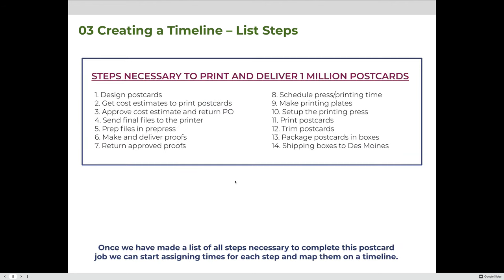The steps to complete the postcards are: design the postcards, get cost estimates to print them, approve the costs and return a purchase order, send the final design files to the printer, the pre-press department will prep the files, they will make and deliver proofs for us to approve, the printing company will schedule us for press time, make the printing plates, set up the press, print the postcards, trim them to size, pack them into boxes, and finally ship them to Des Moines, Iowa.